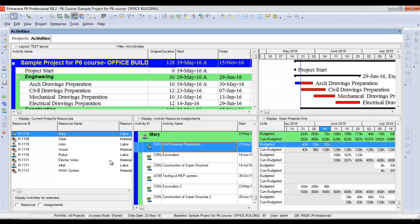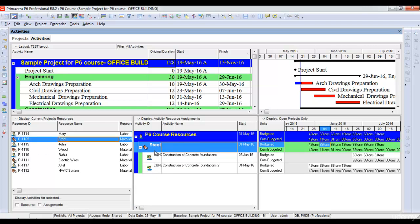32 hours. Similarly, if I select another resource like steel, it will show me in the second section to which activity this steel is assigned and how many tons of steel are assigned weekly to each activity. It also